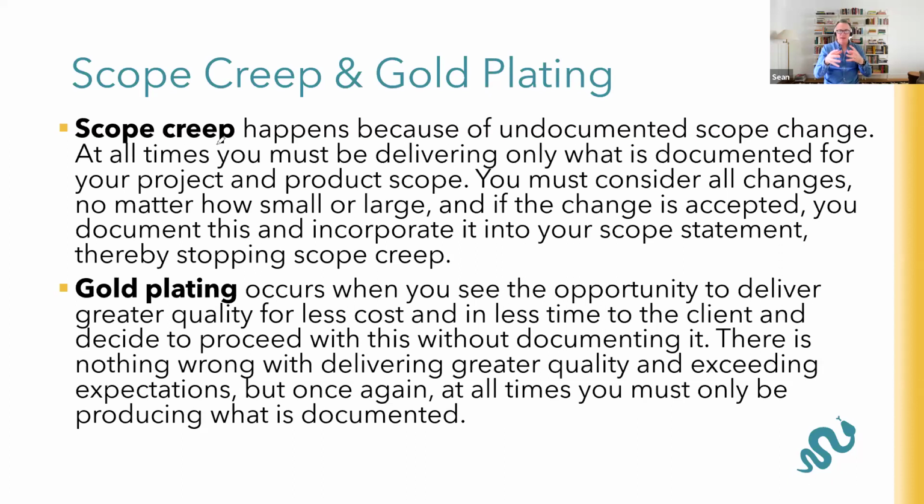That the project manager thought they were just doing what the client wanted and just verbally agreeing to everything. Now, you should be prepared for change, but scope creep means undocumented change. That's that keyword there, undocumented. In each of those instances, what should have happened was the project manager would have said, I hear you. I'll tell you what, when I get back to my computer, I'll send you an email.